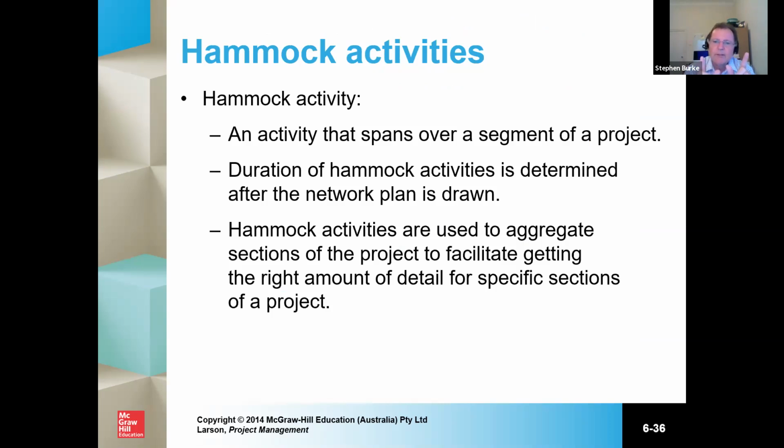The duration is determined after the network plan is drawn, and hammock activities are often used to aggregate sections of the project to facilitate getting the right amount of detail for specific sections. In other words, you start to group things together, hold them all together, and stretch them between two significant activities.